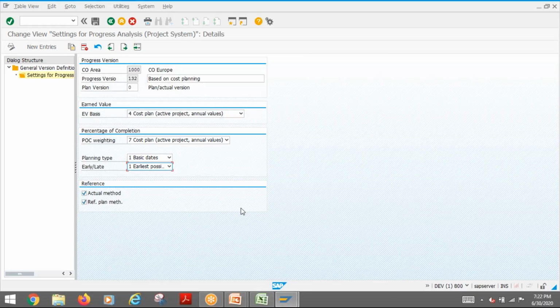So, Abdul, is this the baseline thing which you explained in the presentation? No, this is the progress version. Baseline is what I discussed in detail during the scheduling time. Normally the first schedule you create, the initial schedule, is known as the baseline. But in SAP we don't have something called a baseline, so for that we normally use the project version. You create a version the first time, and that will be known as the basic version.